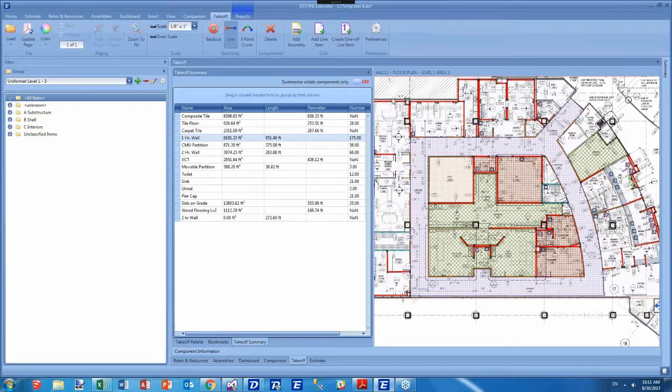So you'd end up having tens of thousands of assemblies, and even more line items inside of an estimate, and it would bog it down a little bit, especially when you wanted to flatten everything out and view holistically the entire thing. And so one of the changes that we are making in 2017 3.0 is if I select 200 different wall segments and I tie an assembly to it, I've added one assembly to those 200 different wall segments. Now, if I modify any one of these wall segments, just like in previous versions, it will update that assembly if the parametric variable that I associated with that costing was modified.